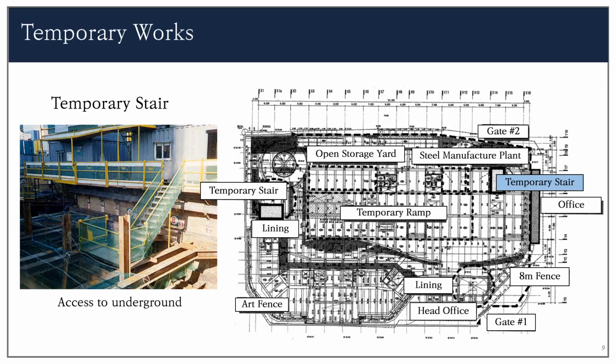Stairs were needed to be used as vertical lines for workers. Temporary stairs were set up outside the site to allow them access to the basement. If the stairway of this building is completed, it can also be used.